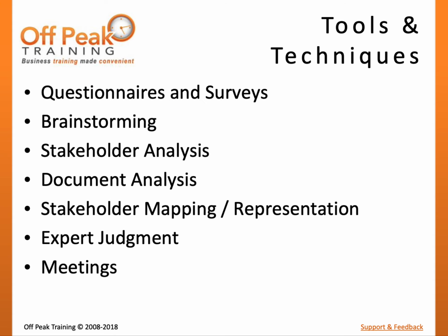There are several tools and techniques for the Identify Stakeholders process. Questionnaires and surveys help to identify stakeholders and their interests from a broad audience. Brainstorming involves team discussion to identify stakeholders. The primary tool and technique for this process is called stakeholder analysis. Stakeholder analysis involves 3 steps to document all of the individuals and organizations that have a stake in the project and gain a better understanding of their expectations.